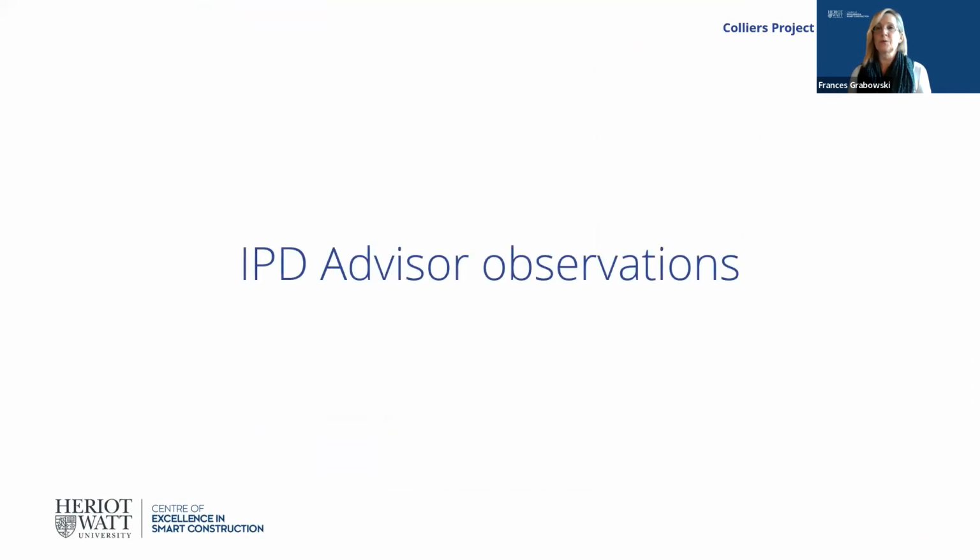But I think that the most important thing is that being at the table, and when the numbers started coming in higher, we had to really kind of pick apart the risks. And one of the things that we use is a risk register, which is critically important. We haven't really talked about that, but you identify all the unknowns. So in a traditional sense, you would not do that. So especially underground, until you're out of the ground, you have unknowns. So we carried in our contingency a risk register that actually identifies those. And we were able to work through that and do studies ahead of time, whether geotechnical, drop boreholes, do some tests on site, move soil, in order to really remove some of those risks so that we had the right number.